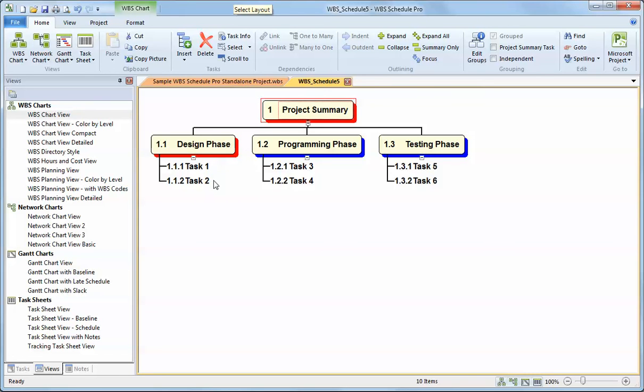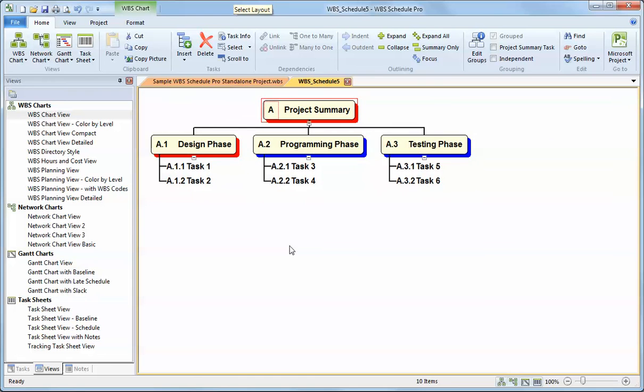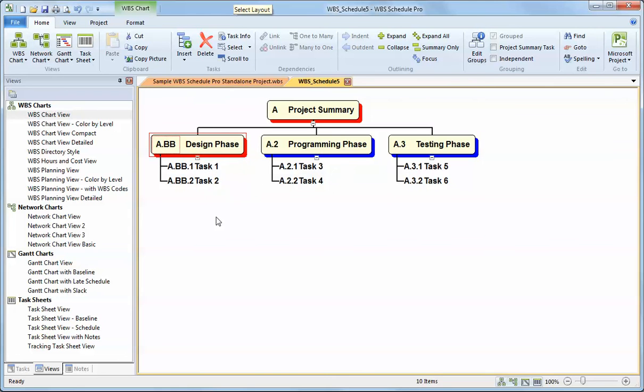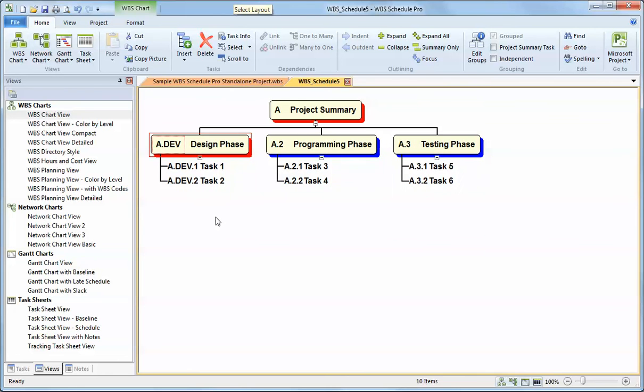In the Home tab under Project Summary, there is a top-level box that's WBS 0. So if I used that as the project summary, it would start numbering the tasks at level 0. But for the most part, I like to leave the project summary task off and just start my numbering at 1. There are actually three ways to code your WBS charts with WBS coding. One is to do the automatic approach, which is the 1, the 1.1, the 1.1.1. And you can also type your own coding in at any level. So I can type A at the top level. And when I do that, it will propagate all the way down the tree. At the second level, maybe I want this to be the DEV level to correspond to the development or design phase. And you can see that as you type in your own codes, it will propagate down the tree based on the level that you're on and things below it.